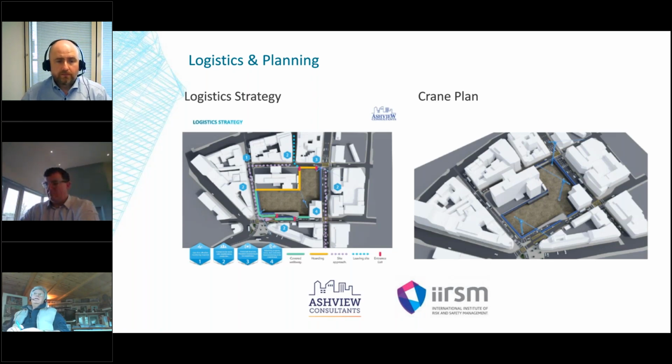So it's fundamental having this early logistic analysis, which some people just don't think is relevant until they get to site and find that they're shut down because the hospital next door can't operate as a consequence of all the vibration and noise or whatever it might be.